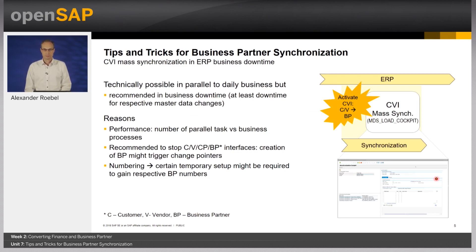Let me say a few words about business downtime for business partner synchronization. Technically, it would be possible to execute business partner synchronization in a business uptime, meaning in parallel to normal daily business. However, we recommend a downtime to execute this exercise. This is for three main reasons. First is performance — business partner synchronization can run in the background, but consumes a certain number of dialogue tasks that might be required.